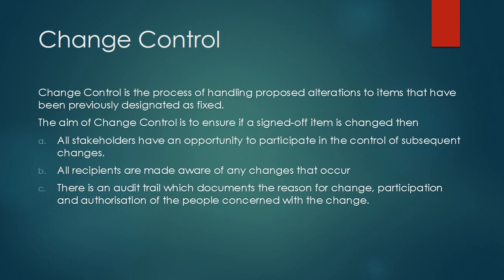Something like a vendor who is supplying the raw material right in the middle of the project comes and says that he is going to revise the rate of the material. Obviously that is going to affect the cost. So that's an independent kind of cost change control. There may be a change in the deadline by any individual vendor that may impact only the schedule of the project, not the scope and not the cost.